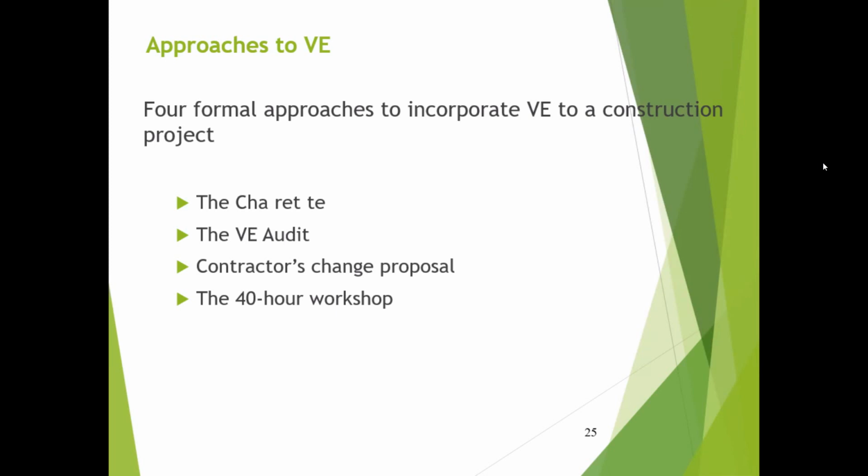So, yeah, depending on the nature of the project. If you're talking about a construction project, we have the design stage, or even before the design stage, we have a planning stage. Even at that stage itself, we can think of these value enhancement activities, right? Or else, once the design is halfway through, we can see whether we can incorporate any value enhancement activities by giving a special focus to that, right?